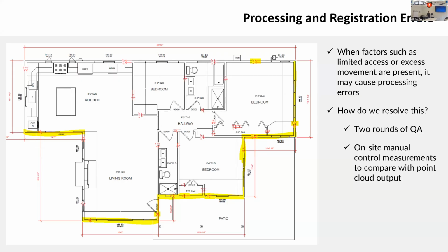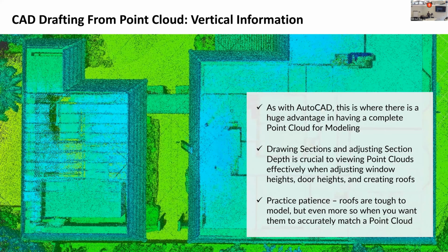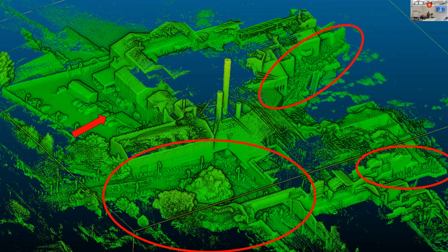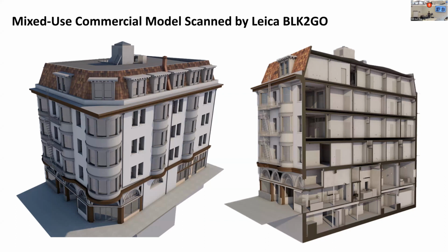Oh yeah, for sure. That project all the way back, that office space in Berkeley. I priced this at less than 10,000, and I had our modeling team get pretty upset with me after I priced it because the amount of work that was put in was substantially more than what it ended up. We guessed based on access, based on size. Access was a huge thing because it was just different office spaces, so that added hours and hours of time.